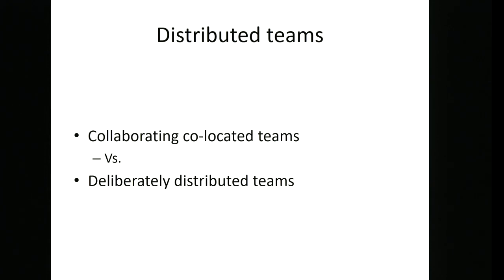So there's different ways of distributing work between distributed teams. One thing is that you might make sure that certain parts of a product are only developed in one particular location. So let's take Microsoft Office as a good example. The product will be owned and fully integrated probably at their head office, let's say in Seattle. You might have the Word team in London, the spreadsheet team in Seattle, and the PowerPoint team in Silicon Valley or something like that.